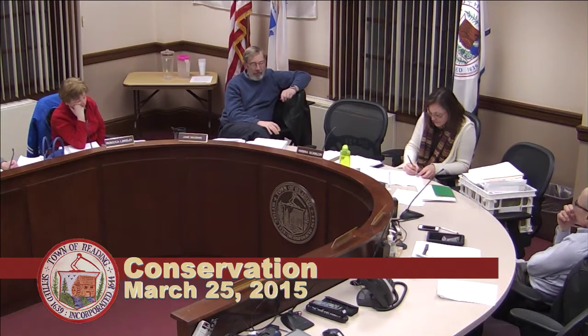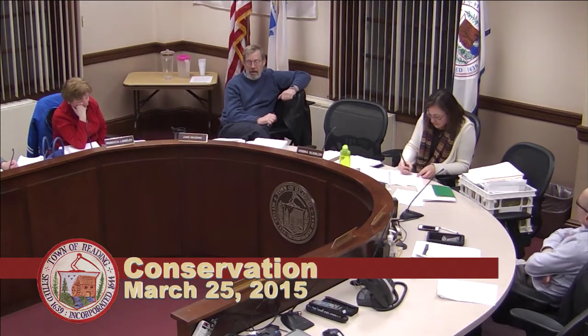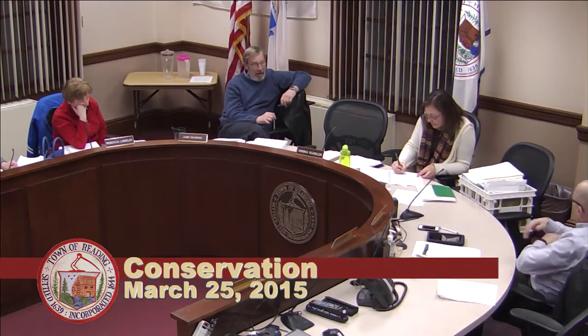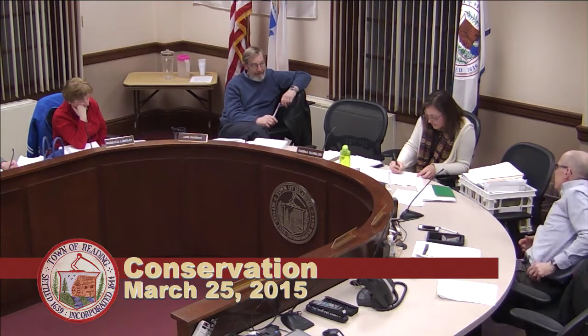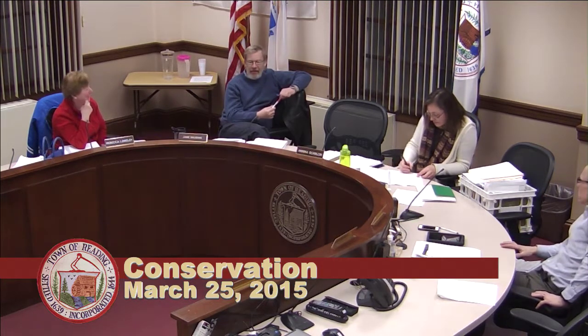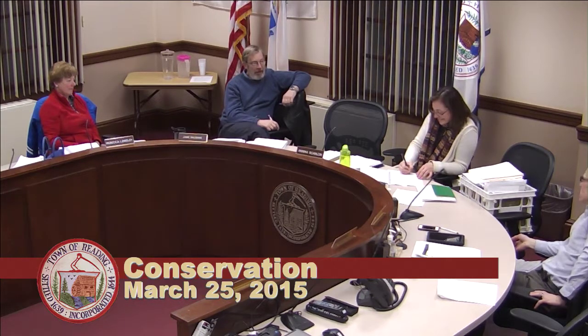Telling them what they're looking at, what kind of impacts they expect from the project. And you can tell them, you have to look at this, that, and the other thing, and then they're obligated to do it. And then they also have a site visit, too, that you're supposed to be notified of. Is that correct? Not necessarily. So we want to be at the scoping meeting and provide input to it. Right. I don't know if we do, but if you do, that's the way we get involved. Okay.